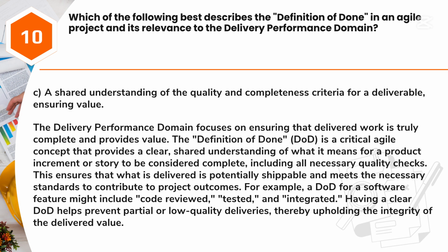Answer: C. A shared understanding of the quality and completeness criteria for a deliverable, ensuring value. The delivery performance domain focuses on ensuring that delivered work is truly complete and provides value. The definition of done, DoD, is a critical Agile concept that provides a clear, shared understanding of what it means for a product increment or story to be considered complete, including all necessary quality checks.